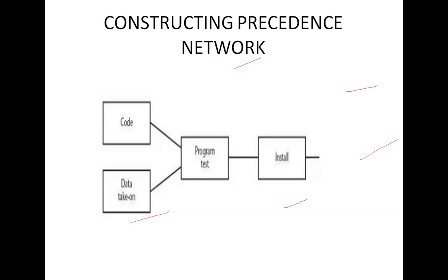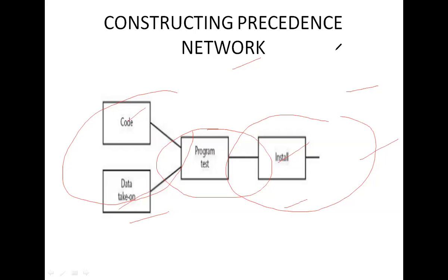Installation cannot start until program testing is completed. Only when the program testing is completed do we start the installation. See this diagram. Program test cannot start until code and data take are completed. Only when both of these are completed do we move to the program test, and when the program test is completed, we move to the installation. So this is called constructing precedents.